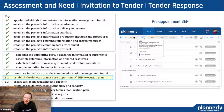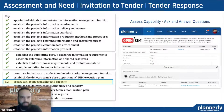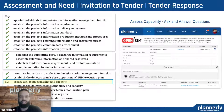And then we have pre-appointment BIM execution plans. Every delivery team would then respond to that EIR to make sure that we are having competent teams that are able to complete those requirements. Inside the workflow, it will talk about how those are assigned to teams so that each one can be completed independently. We can also assess task team capability and capacity — do we as a prospective team or appointee have the right skills for being involved in this project? Do we have the right size of organization? Is this project a good fit for our organization? That's something that we can evaluate here.